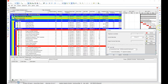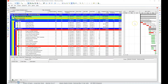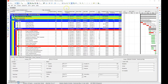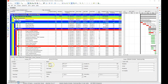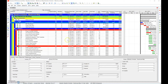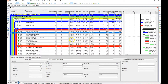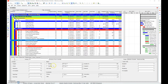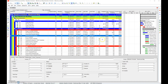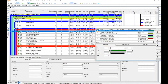Close those settings and hit Schedule before we do anything. Now we're going to go through and update all the percentages. Unlike Microsoft Project, the percentages and dates have to be updated from the detail screen. We can go in through Notice to Proceed — if it's finished, just hit the finish date and it automatically updates and assigns 100%. Some items may be less than 100% complete. You'll see activities turning blue — blue means they're complete.